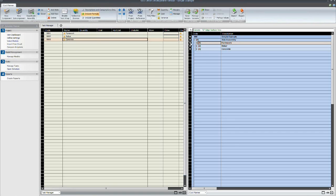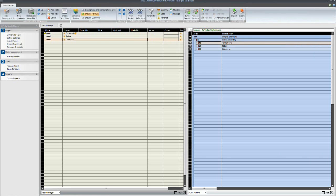And then we just drag and drop from the estimate so we kind of take that resource data and all the cost data and actually put it into the schedule. So I'll allocate these to the tasks.